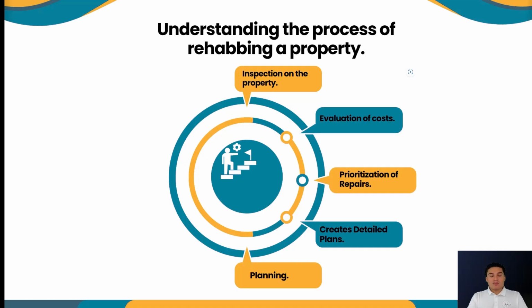Okay, now let's say that you don't know the current cost, but I'm going to give you an example. Let's say you look at the windows and maybe over half of them are broken. Okay, but they have regular, average dimensions. Just from my experience, every window with average dimensions can average from $200 to $250. And let's say the house has 13 windows. So you do the math, right? Is it worth it to just change half of them, or is it worth it to change all of them? Because it's going to be the same price for the contractor to install it.